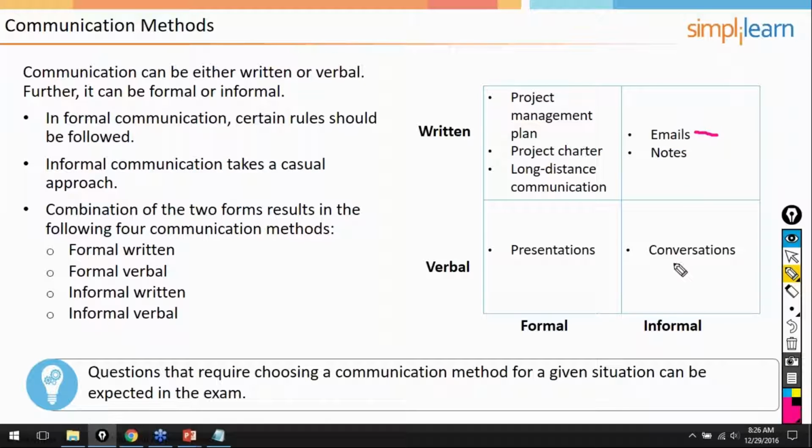Same thing goes for email. Email has no structure. Well, it has a subject and a body, and that's all. The problem is, in order for you to have clarity in emails, you must formalize. And how do we formalize? We create a template, right? Or in the subject header, we say project X, topic, issue, and we're going to have it coded so that everybody looking for this type of email can find it easily.